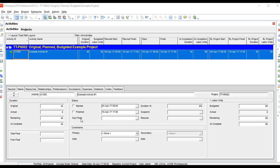For example, without starting the activity, I'm going to change my original duration to 50. Watch how the at completion duration also changed to 50 along with the remaining duration. I'm also going to change my budgeted labor units to 100, and you'll notice that the remaining and at complete both changed to 100 as well.